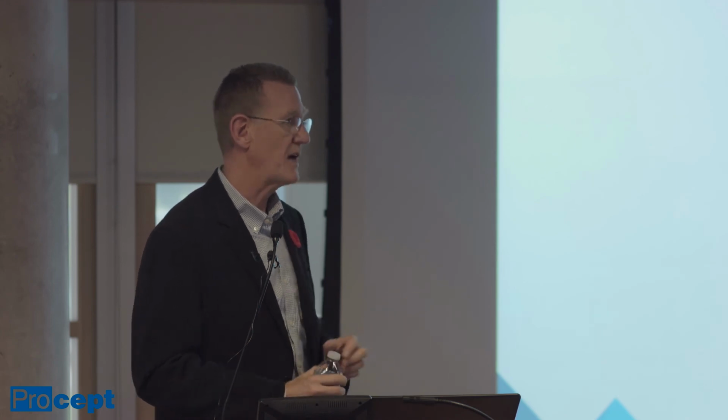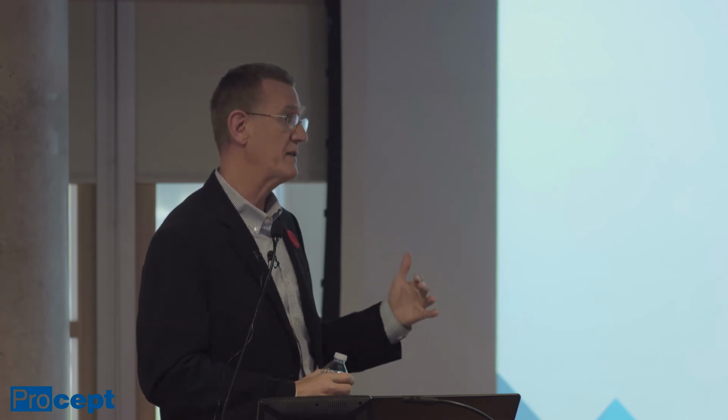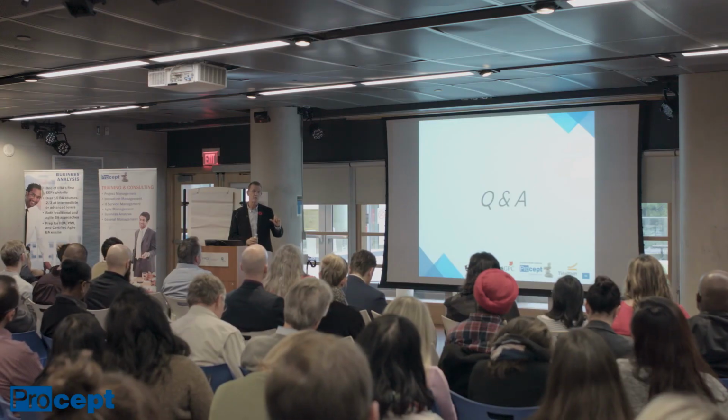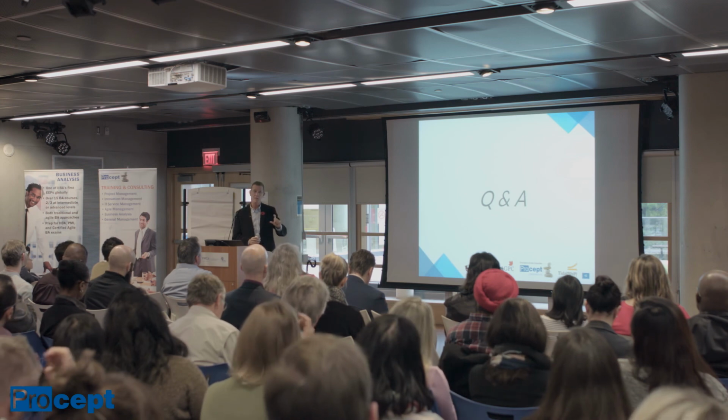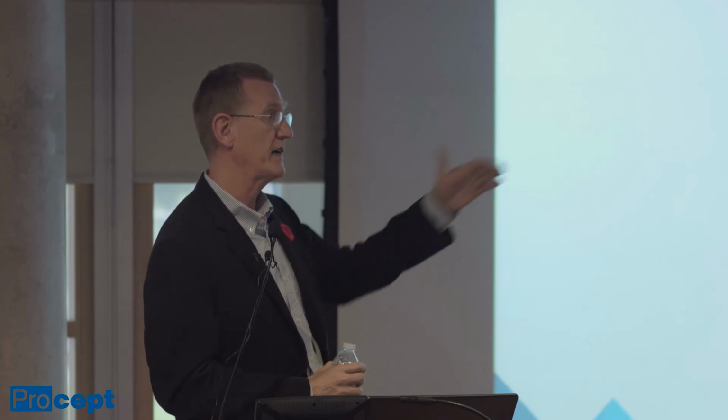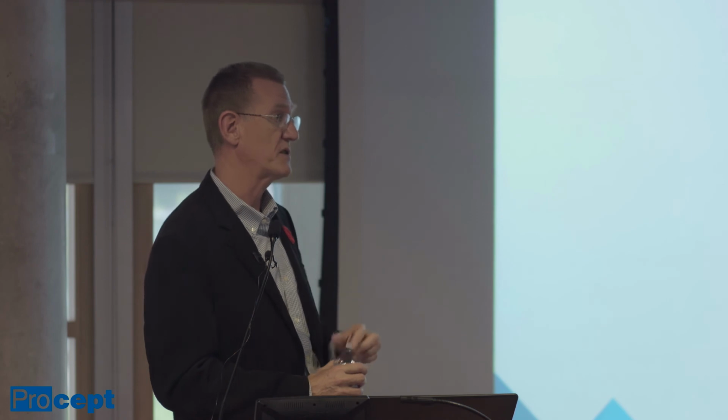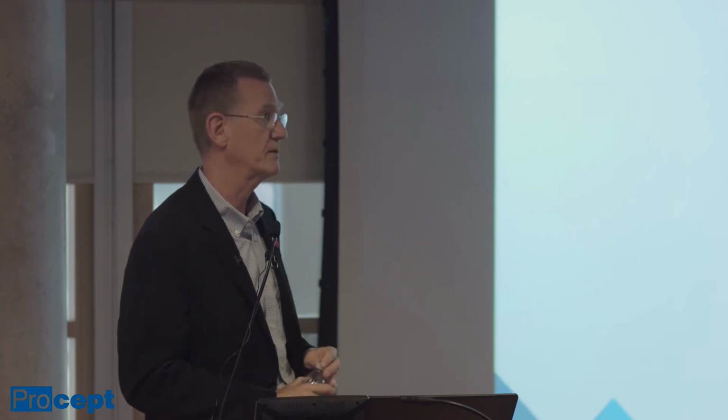I didn't have time to go into it, but one of the ways that we mitigated that was by having a mentorship situation where you had a strong person with a weaker person on the same team. And then that person would be seconded out to another team once they were brought up to speed. Great question. Another question?